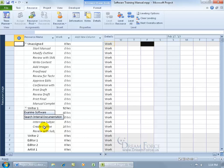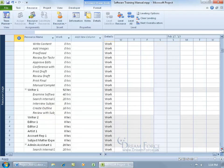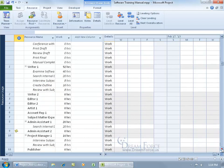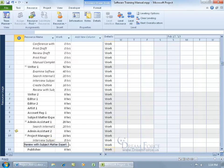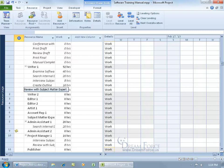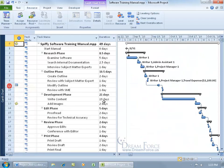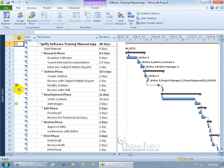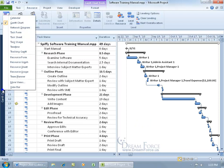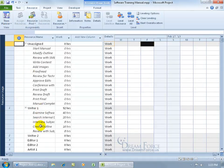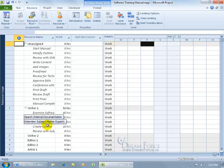So for Rider 1, he's assigned to these resources, and you can go ahead and scroll down and see the admin assistant is assigned to that one, project manager is assigned to that one. And so quickly, instead of focusing on the task, you can go over to the resource usage for the resource and their usage, see if that helps stick in your brain, to find out if they're being used or not and what tasks they're assigned to. Because you can do it in the Gantt chart, let's right click and go to the Gantt chart, look over here and go, let's see, Rider 1, Rider 1, Rider 1, maybe Rider 1's down here. Not as clearly spelled out as when you go to right click resource usage. Hey, it's all right there, grouped under one resource, all the tasks they're assigned to.